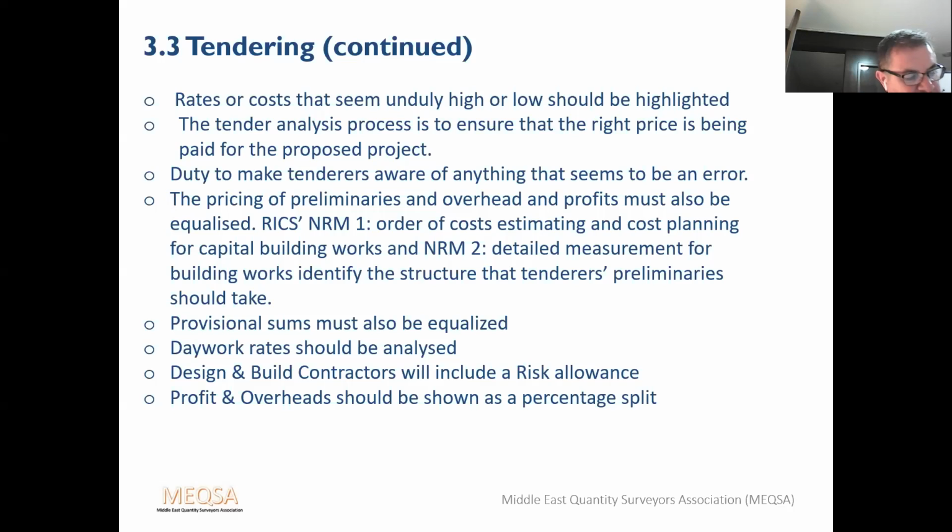If the daywork rates are to be used in a project and the submitted rates should be analysed, it's prudent to include a risk register in the tender documents as well, which clarifies the risks which the contractor is expected to take forward and which risks remain with the client. This register can then be used to base price risk allowances on and can be analysed and normalised in a similar fashion to the works cost.